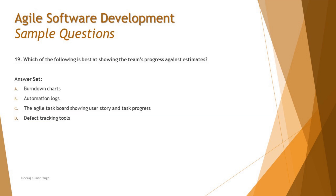Moving on to question 19: which of the following is best at showing the team's progress against estimates? The answer options are: A — burn-down charts, B — automation logs, C — the agile task board showing user stories and task progress, D — defect tracking tools. Say you estimated three days of work; you need a metric tracking progress on day one, two, and three to show whether the team is progressing per estimates.